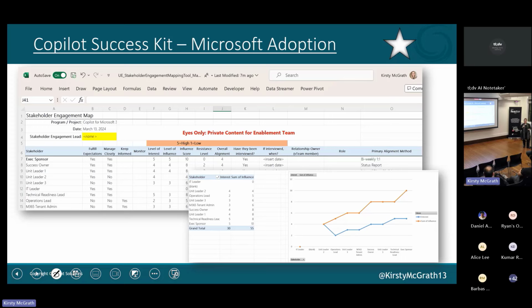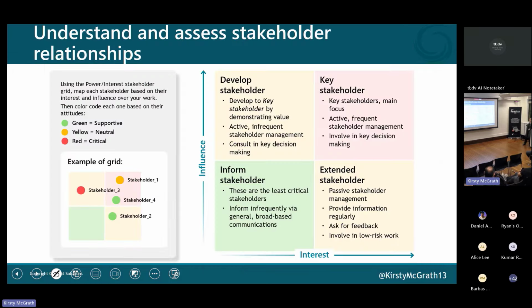Not long ago I had an HR manager who took a whole program down. A whole program, okay? Because she wasn't there for three quarters of it, came back and just went, no. She had quite a lot of influence and then wasn't tackled fast enough. So be careful. Understand your stakeholders so you're able to map it out and work it out.